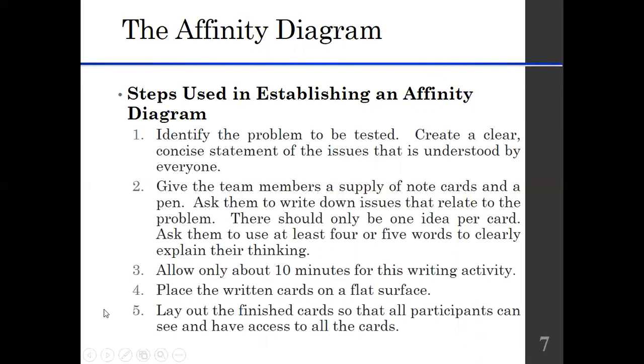The second one is you should provide the team members with cards or sticky notes and a pen. Then each of the team members has to write a main idea in few words on each sticky note. After that, allow only 10 minutes for this writing activity, and then place the written cards on a flat surface. The flat surface can be a table or ground or floor.